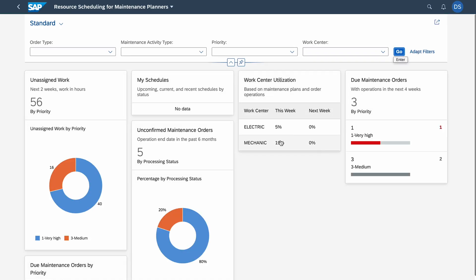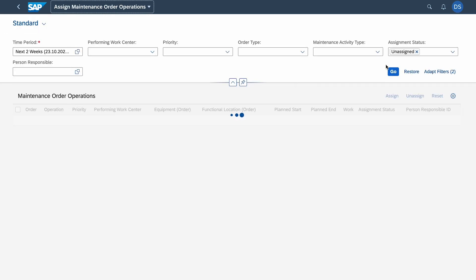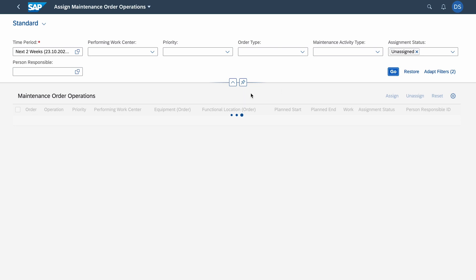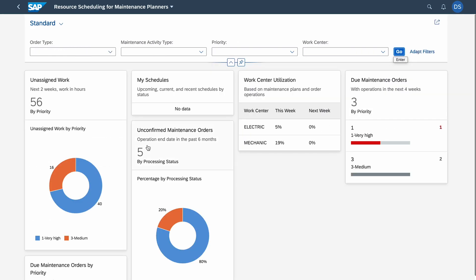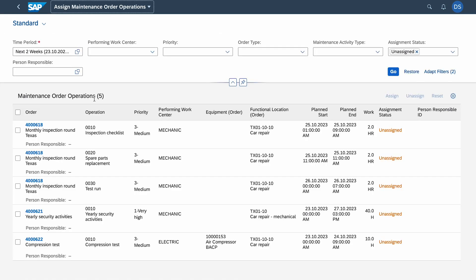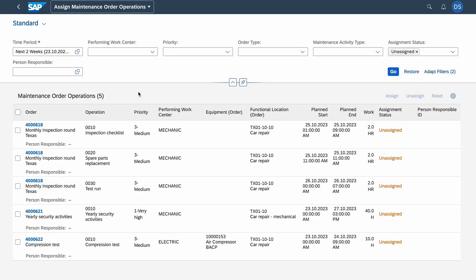I select it and here I will use the option Change and I plan it for tomorrow. Now we see the utilization has changed and mechanics are not overloaded. They are like 20 percent utilized for this week. If we go for instance to Unassigned Work, we will see basically the operations with unassigned status.